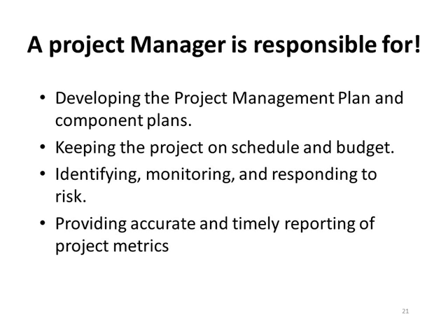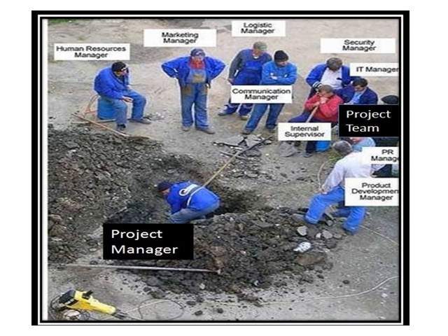Every work in a project is the responsibility of the project manager. But there are three main responsibilities. They are developing the project management plan and component plans, keeping the project on schedule and on budget, identifying, monitoring, and responding to risk, and providing accurate and timely reporting of the project metrics.